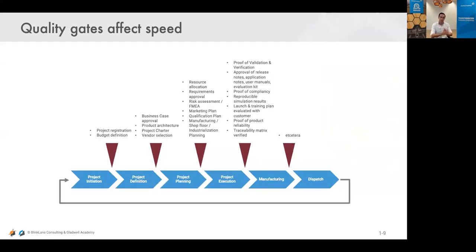So the thing is, the value streams that we know in hardware development environments are, let's say, quite risky. What do I mean by that? A value stream is a couple of steps, and after every step, we would like to check whether we are on track. And in hardware development specifically, the changes that are made later in the process become more expensive. So essentially the cost of change increases